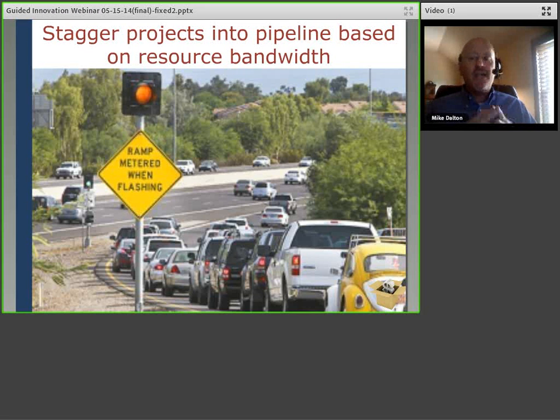And so again, moving back to the challenge that we talked about with multiple projects, right? Because that's where, in the real world, we live with multiple projects. If you're familiar with the on-ramp controls used to meter traffic onto a busy highway, the critical chain answer to managing your available resource bandwidth is a very similar approach, where we meter in projects at a pace that doesn't delay any of the projects already underway.